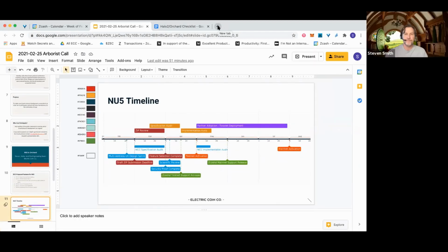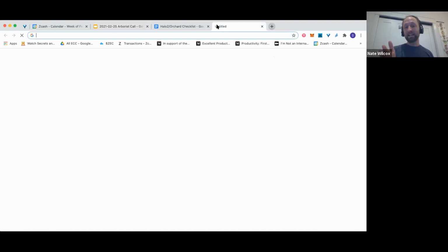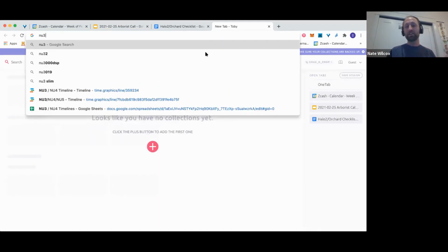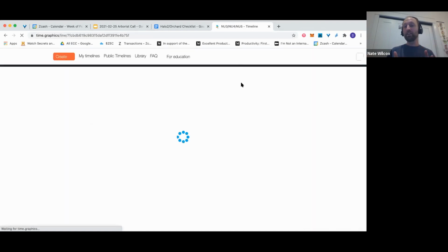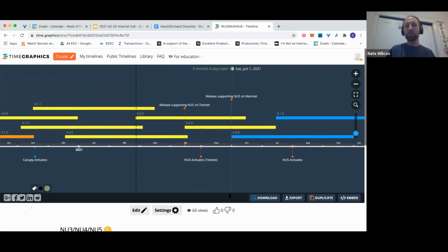Yeah. Right. So if we discover a flaw that requires fixing before that Zcashd mainnet release date, it's easier to slide the schedule. But then, of course, the question is, will this take 2 weeks to mitigate, like 2 weeks to do the development and testing, or will it take 2 months or 5 months? And sometimes you don't know.